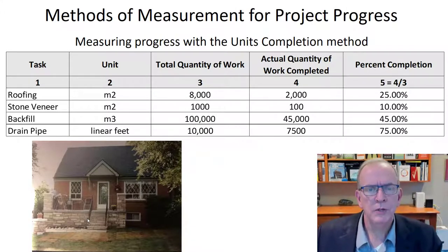And then they would measure that based on typically square meters or square yards of installed work. So just some examples, and I've got some for cubic, right? If it was earth, it would be cubic. And then you get into some of the trades like running conduits, running drain pipe and piping materials. Then you can get into linear feet too.